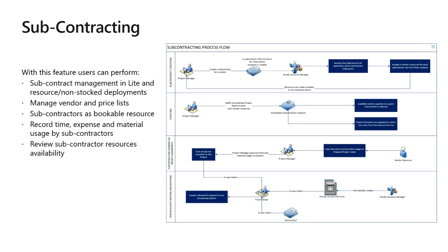Then once you confirm that everything matches up, it reverses the original actuals and uses the final actuals as reflected on the pending vendor invoice. So that's obviously a fairly complex process when you think about it end to end, but all the elements are there now. And as I said, we are planning to do a tech talk on this specifically.